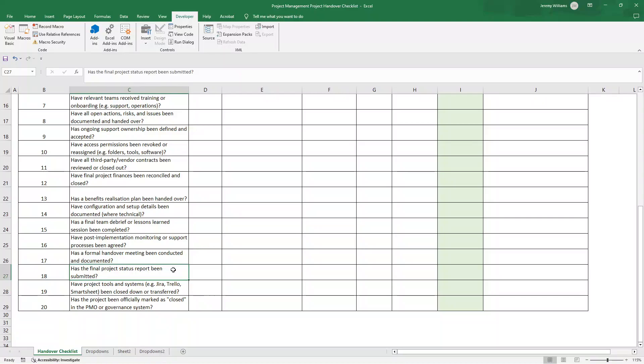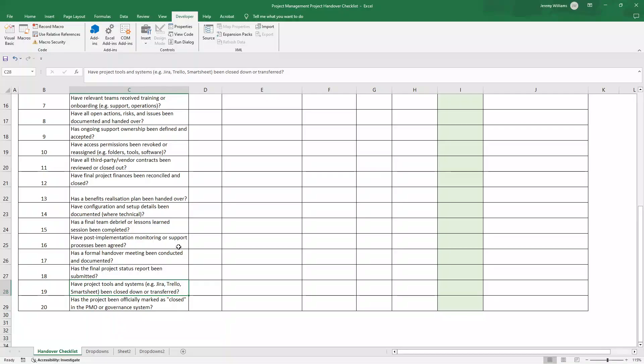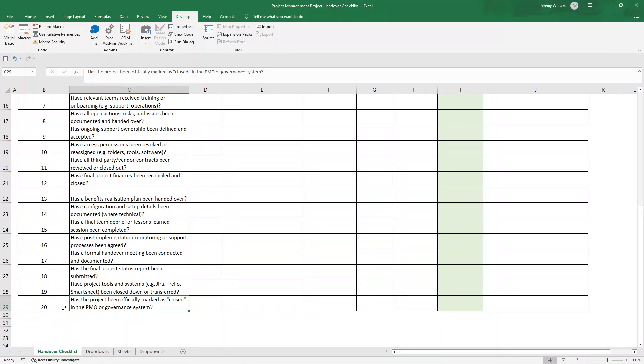Have post implementation monitoring or support processes been agreed? Has a formal handover meeting been conducted and documented? Has the final project status report been submitted? Have project tools and systems such as Trello, Smartsheet, Asana, etc. been closed down or transferred? And has the project been officially marked as closed in the PMO or governance system? Now, these are the highest leveraged 20 activities. Of course, you might want to add more. You can do that as you see fit.